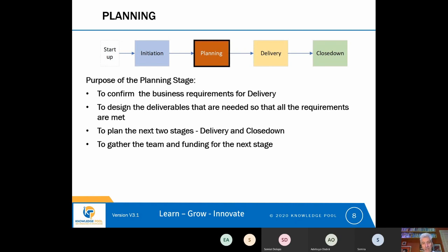The other approach that you could take is to say, well, we will take the risk that we pick the wrong CRM. And if we find a requirement that the CRM can't meet, when we find that requirement, we will find a CRM system that can meet it, and we will change to using that other system. That would be an Agile approach, because it suggests that we are flexible enough to try one system until we find it doesn't work for us, and then quickly switch to a different system.